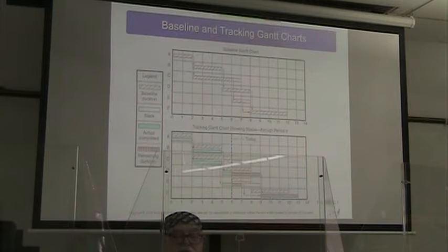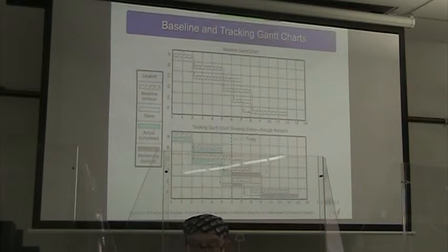But we're forecasting that D is going to take an extra time period. So overall, we're expecting our project to last an extra time period than we originally forecast.